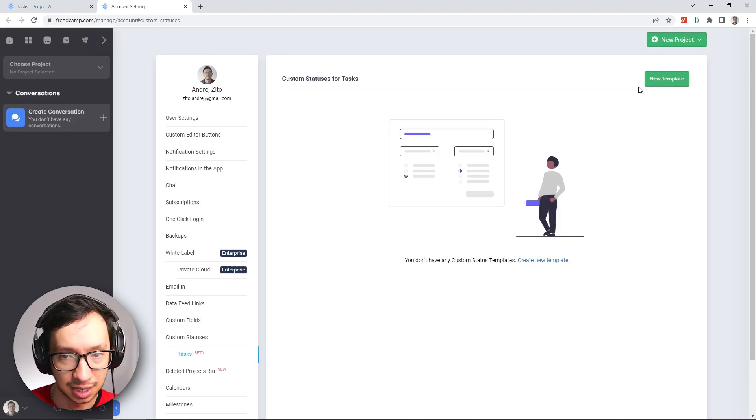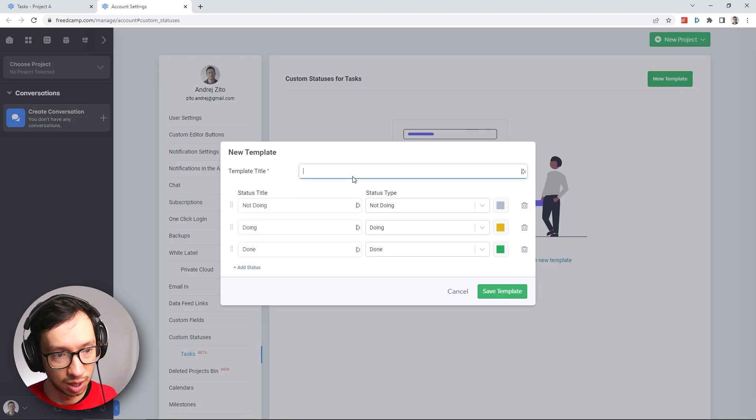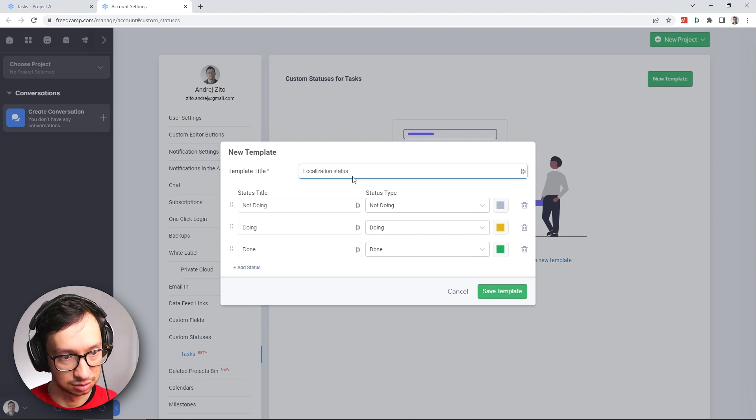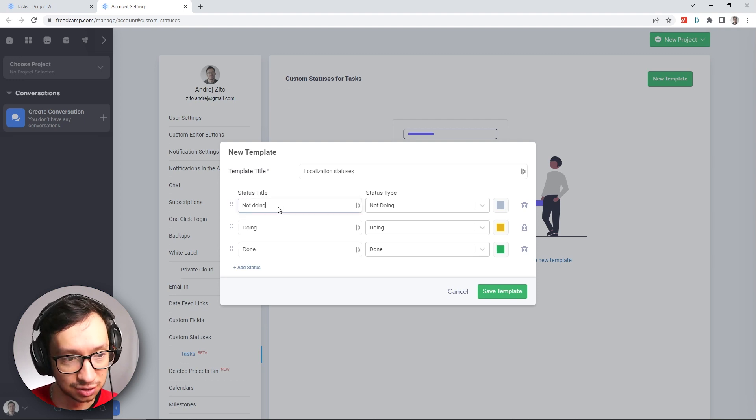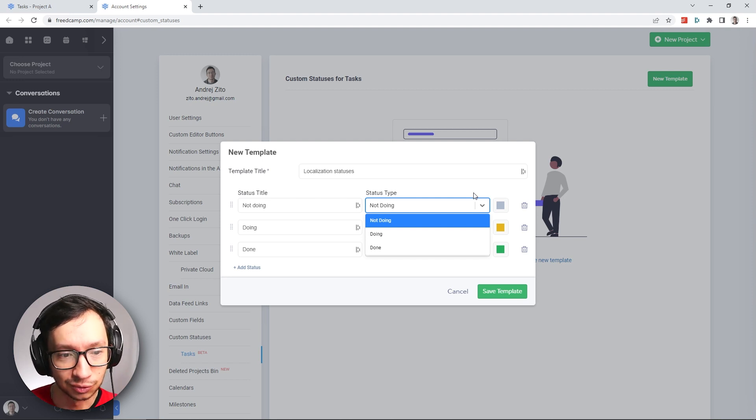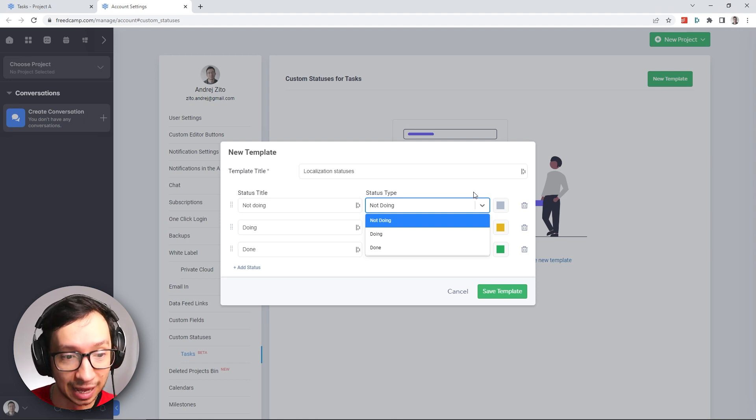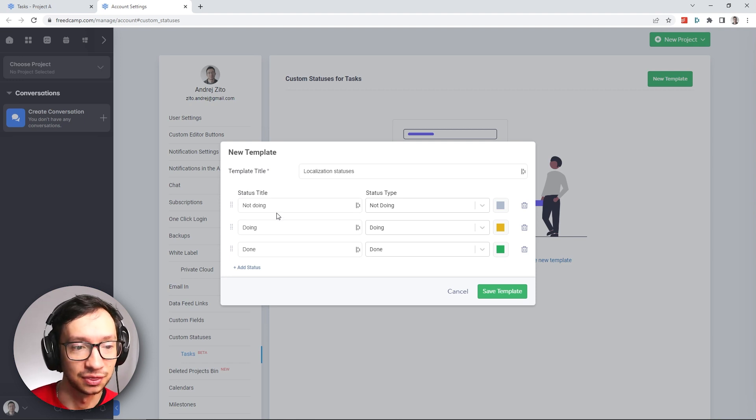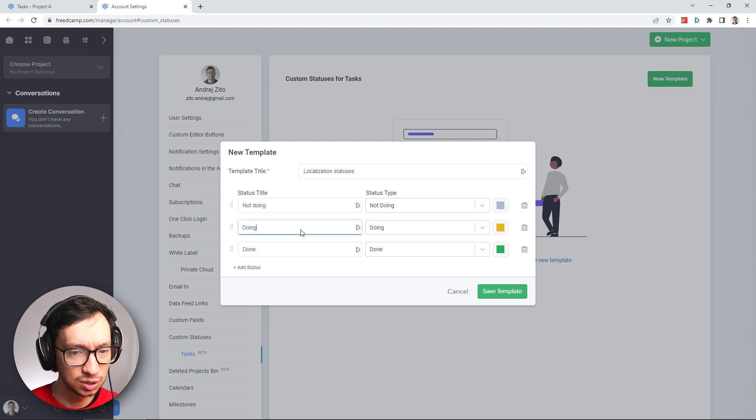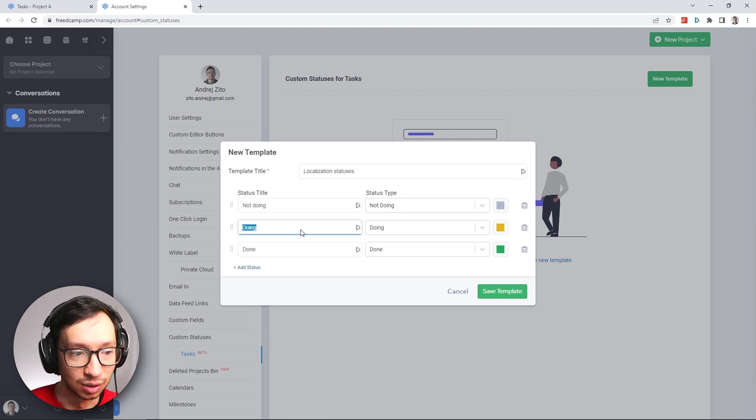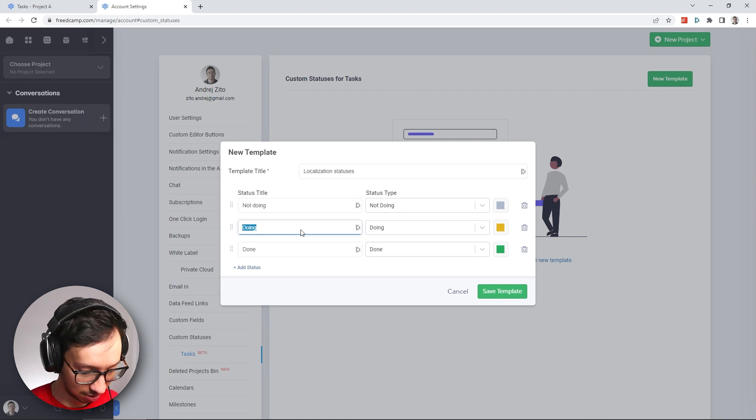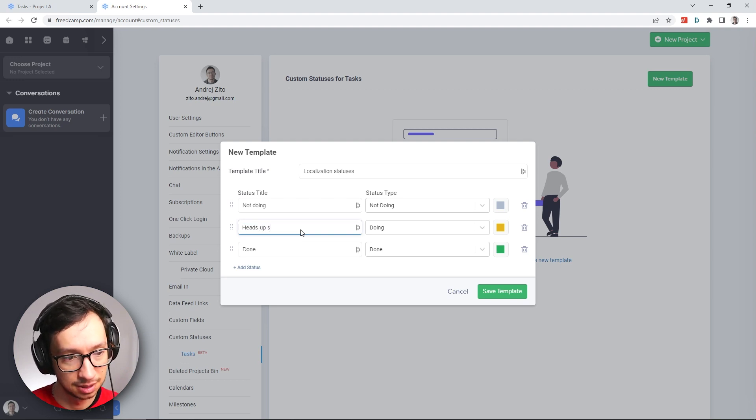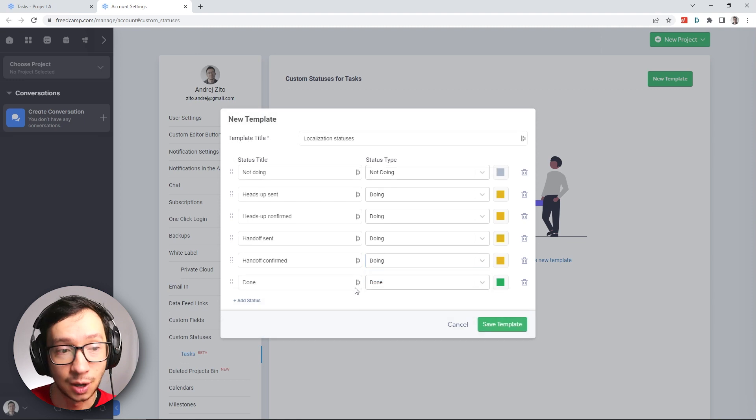And here we can create a new template for the statuses. So I'm just going to say Localization. Now, on the left side you can see the status titles that you can modify yourself. But on the right side, you still want to match your titles to the three default status types that the system gives you, which is not doing, doing, and done. We're going to keep not doing as it is because it's something that still needs to be worked on. And we're going to focus mostly on the doing parts. So we don't need to have one big status just to see if things are in progress or doing. We're going to start adding our smaller statuses which are related to localization and project management, which will be heads up sent, and then confirmed. Alright, this is how I set it up.